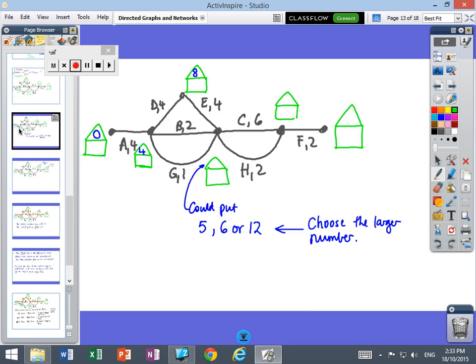So what we're going to do is start by filling in numbers. At the start, right back here, we put 0. So the activity started at 0, and at the end of A's activity, we've got a 4 in the top box. And now we're going in different directions. So again, the arrow should be here. From A, D takes 4 minutes, but we've already got 4 minutes already. So 4 plus 4 equals 8. So 8 is the time there.